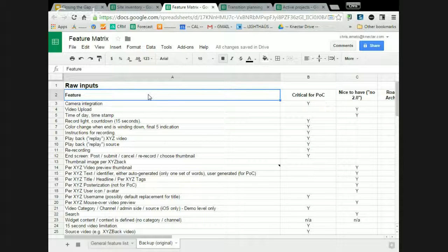So what we want to do is organize this and do a gap analysis. The gap analysis in this particular case is not asking what the one before asked: is this content ready to get populated? That was one gap analysis. This is a more challenging and interesting one, which is what is feasible in phase one on your budget in terms of features, and what is feasible but maybe not in your budget, or maybe for other business reasons not a great idea to put in your initial version of your product.